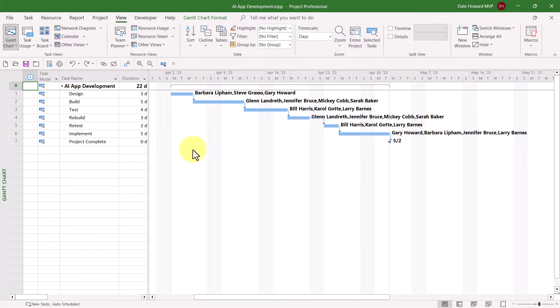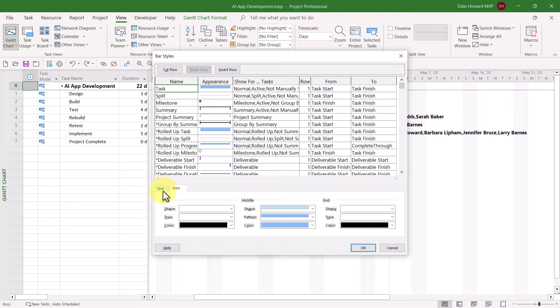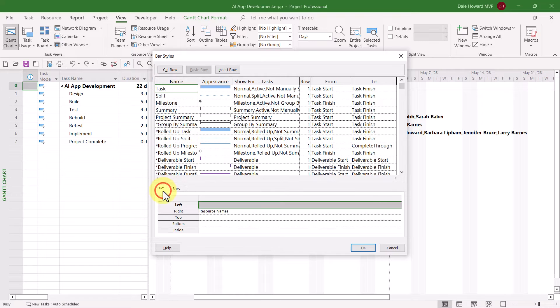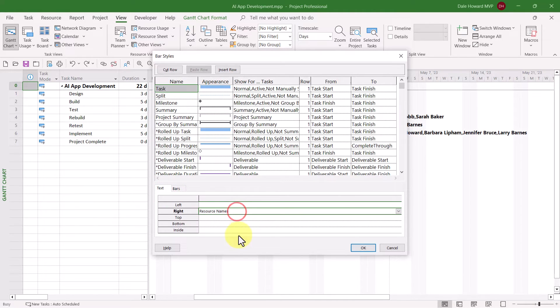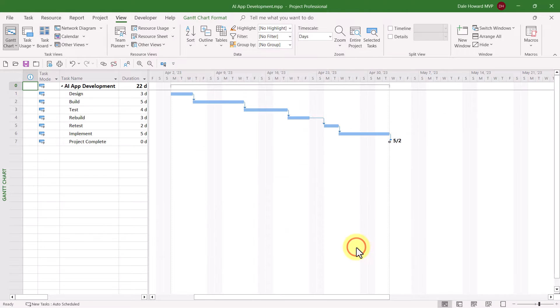Double-click anywhere in the white part of the Gantt chart screen. Leave the task item selected at the top. Click the Text tab at the bottom, and then select the right field area where you see the word Resource Names. Select the Resource Names field, press the Delete key on your computer keyboard, and then click the OK button.